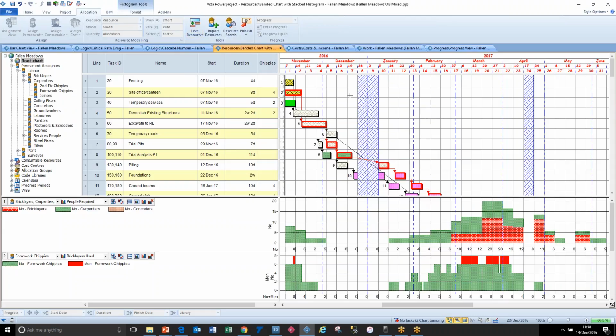So obviously nobody's going to delay the project for the lack of a couple of carpenters. If it's a subcontractor, you've sort of offset the risk, but at least you know how many people you're going to have. But you might think about that resource leveling for materials and the hoist, craneage lifts. Can you get this amount of plasterboard into the building in the time given? You know, those sorts of critical decision resources.